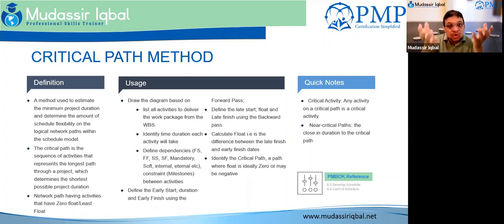So you need to know what kind of resources you may have. You realize that, fine, Mudassir is taking 2 more days, but it is not impacting my external milestone or my external dependencies of delivering the project, and I don't have money to continue with Tharmila. So we put Mudassir, and this activity will take 5 days.